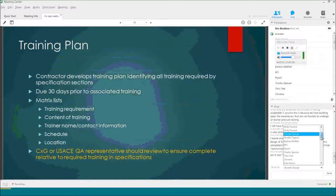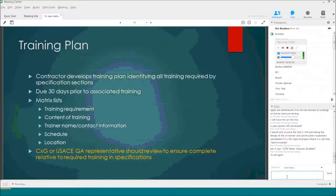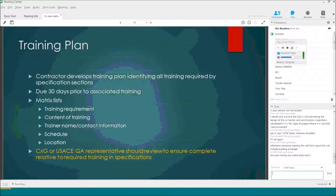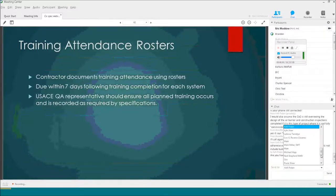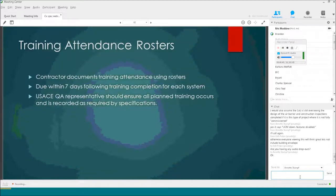The contractor is required to develop a training plan identifying all training required by specification section — a lot of typical specs already have requirements for training. This requires the contractor to give you a list of all types of training required in those specifications, covering what's going to be in the training, the trainer name and content, schedule, and location. It's required at least 30 days prior to the associated training. We need our quality assurance rep or government specialist to review this to ensure we've captured all training requirements in the specification. They need to document training using attendance rosters — within seven days after training is completed for each system, we should get a set of rosters. This is one way to prove that training actually occurred, which is particularly important for LEED.